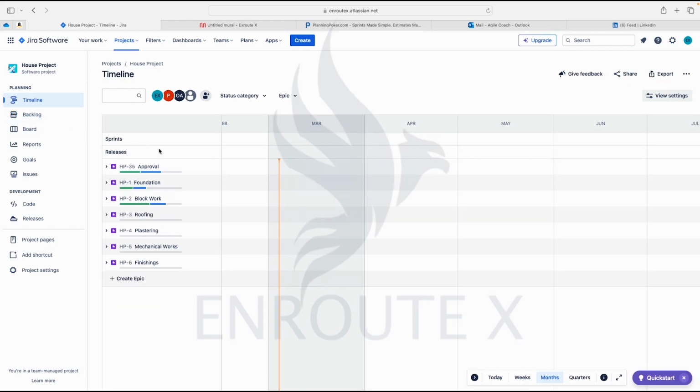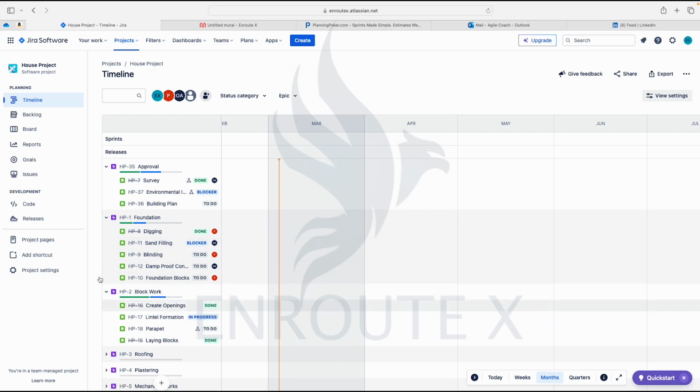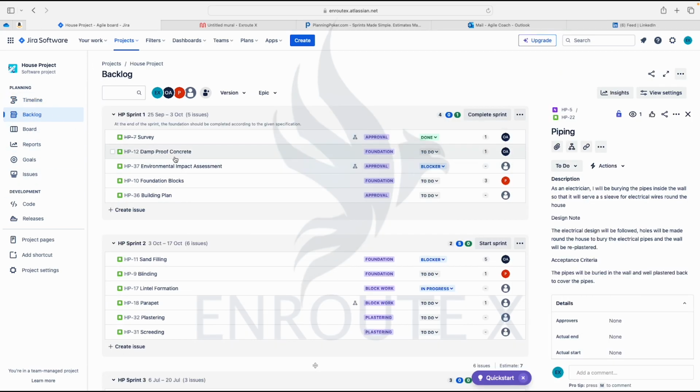So during the sprint review, the team is engaging with the stakeholders, telling them, in the course of us going into the last sprint, we committed to these stories and we were looking at delivering these specifics. And at the end of the sprint, we were able to deliver these ones, leaving out these ones. And these two other ones, we intend to take further into the next sprint and complete in the next sprint. And in the next sprint, we're looking at bringing some other ones.